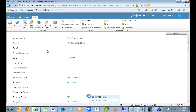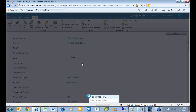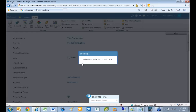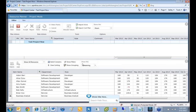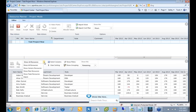The next tool we'll look at is the resource planner. We've put in our project and proposed it, and maybe put in some high-level information. But now it looks interesting — let's put a little bit more information in and see how much resources it's really going to take and how much it's going to cost. I'll hit 'edit resource plan' here, which is going to open up our resource planner. This is before the project even gets started — we're still in the planning phase, it hasn't been accepted. What you can do in here is say what resources you think you're going to need at a high level — not a full schedule with detailed tasks, but things like I need this many developers and this many business analysts. I'm going to switch my view to show generic resources, which will show me things like business analyst, DBA, developer, infrastructure, and so on.